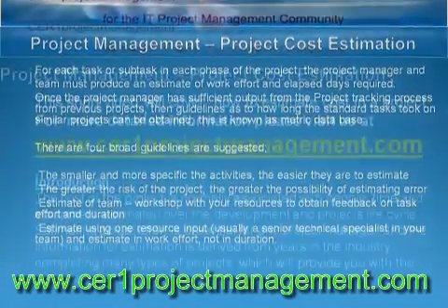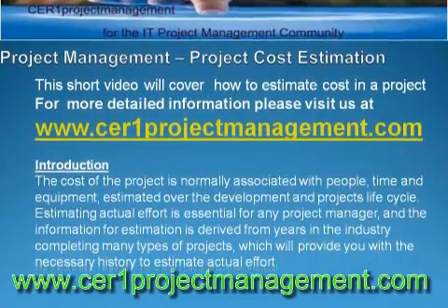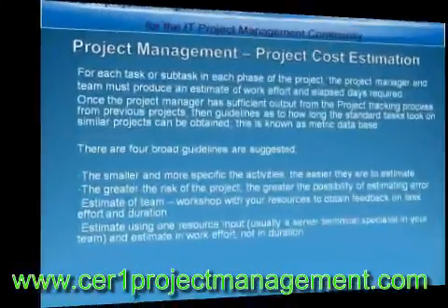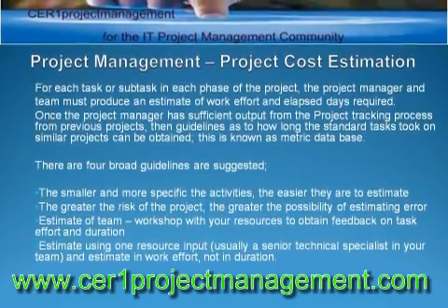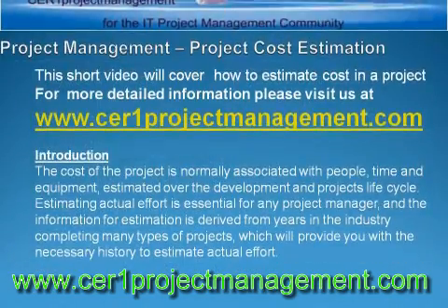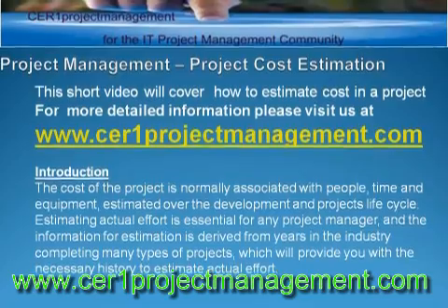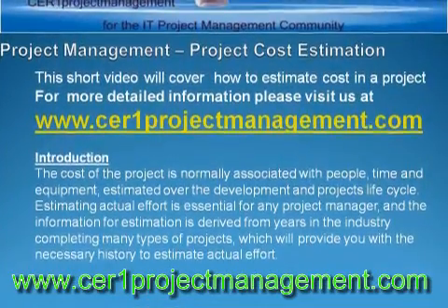For each task or subtask in each phase of the project, the project manager and team must produce an estimate of work effort and elapsed days required. Only when this is completed for a number of projects can a formal estimating history be available.